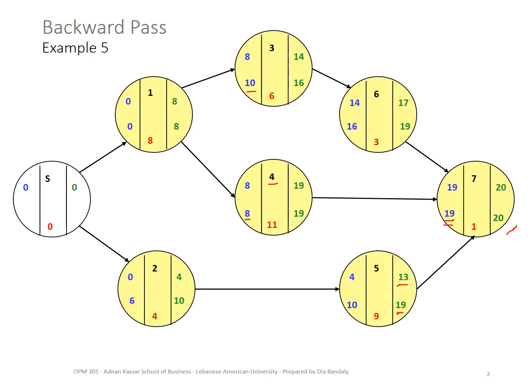Then the starting node, which is virtual, by the way, has 2 succeeding nodes, node 1 and node 2. So the latest finish here will be the earliest of these 2, which is 0 in this case. So here we go, and 0 minus 0 is 0.